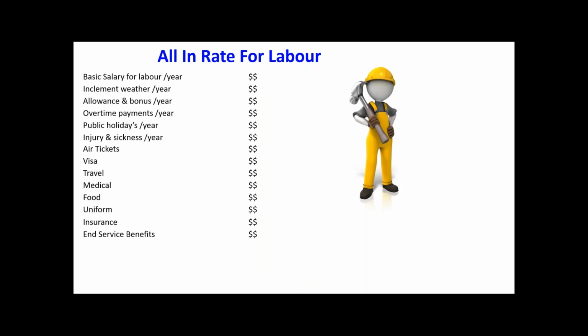Say in India or Sri Lanka, I think the CPF, ETF. Here in Gulf countries, it is called ESB, end of service benefit. As you know, if you are working for 1 year, they have to pay some basic salary. So depending on the location, you have to have some benefit at the end. And tax, sometimes if the salary is high, maybe you have to pay a tax. Yes, you have to pay tax, depending on the country. If there are any other allowances, you have to pay.